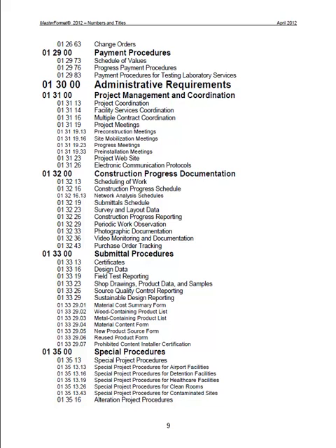Every item in the project needs to be submitted and approved by the engineer. It can be in groups, like electrical stuff will all come in groups with a whole binder of all the products that are going to be used electrically in the project, and the engineer can go through those relatively quickly and make approvals or changes.